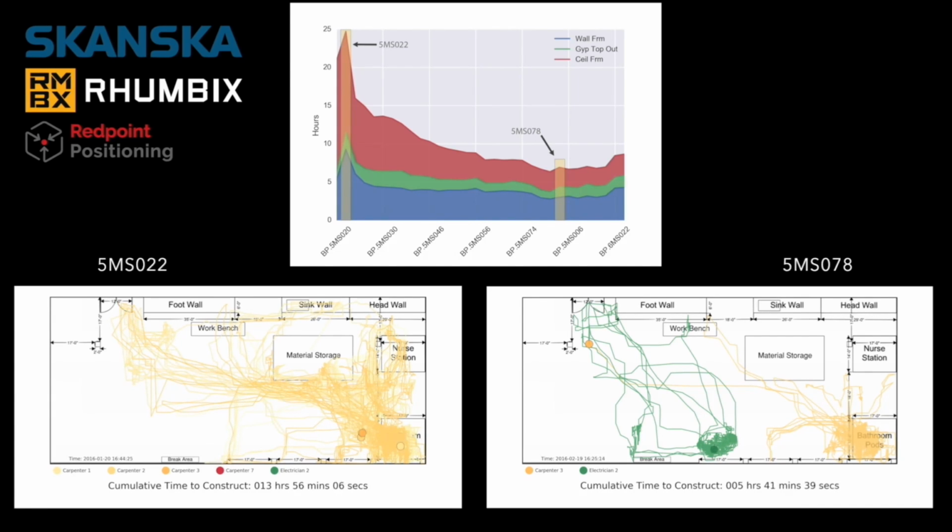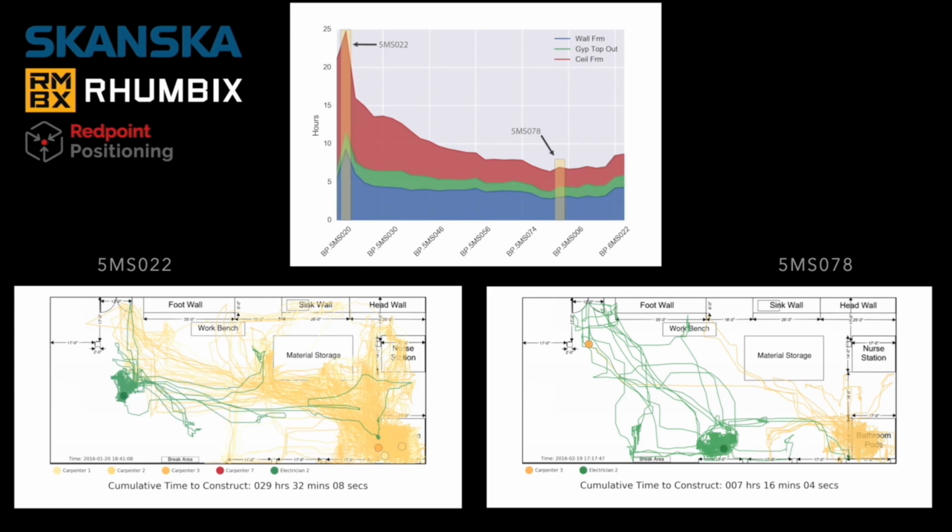So what you're about to see here is over the course of 2 weeks, we shaved 75% off the install time and went from 4 crew members to 2 members. So I'll go ahead and show you this. On the left side of the screen was essentially the first unit, so that's essentially stick building. And then on the right, you're able to see 2 weeks later, and I'll let the video speak for itself, showing the amount of time savings just from eliminating unnecessary trips back to the laydown yard.